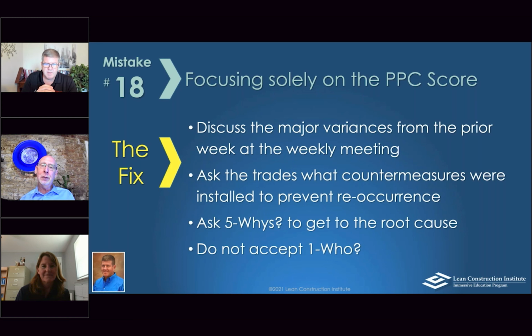What I'm saying is unplanned going faster. Understand that you, as one crew rushing ahead to look good, to make the completion for the end of the month for somebody else, may have screwed up their schedule. And you painted somebody else into a corner because you threw up all the framing and there was no ductwork put in. Yeah, right, exactly. And that's what I'm talking about. So I should be more specific, but we're trying to be quick here, so I apologize.